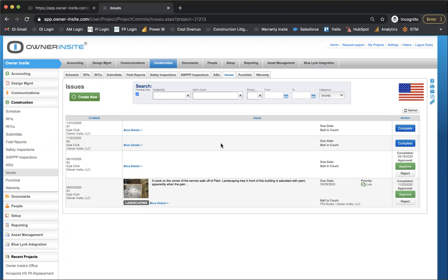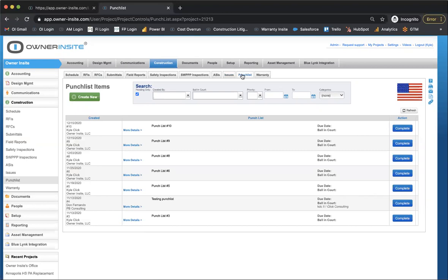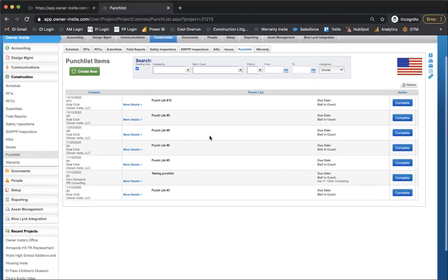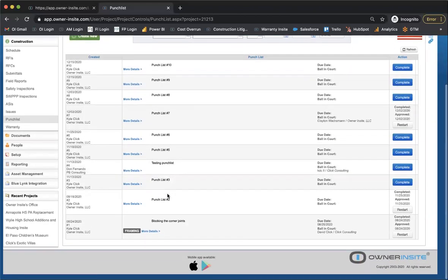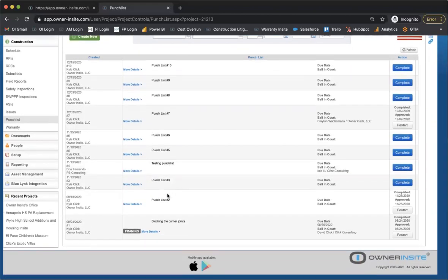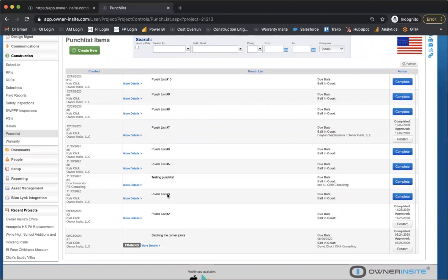On the punch list, exactly as Brian said, is how the architect is using the punch list. We haven't used the punch list at all for HQS. And HQS, as I mentioned in our call yesterday, we really look at HQS for the housing authority and for the management company, because just because the architect has punched it out or there's a CO or substantial completion does not always mean that there's going to be an HQS pass.